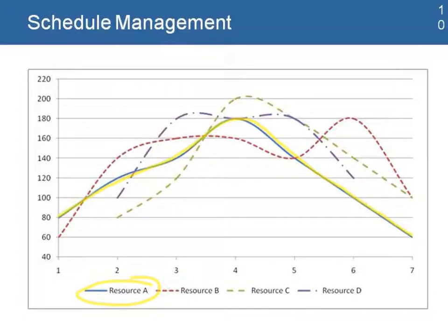But notice that over a specific amount of time, months 1, 2, 3, 4, 5, 6, 7, the amount of time that people can work in a month is mostly 160 hours. A lot of them are exceeding that, based on the original assignments we gave them.